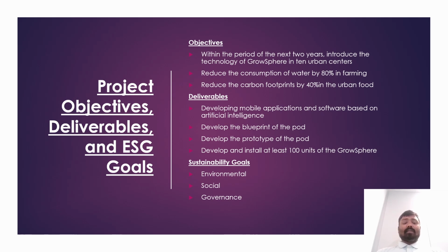Procurement and supply chain, emphasizing local sourcing, certification audits, and contract negotiation. And deployment and commissioning, for on-site assembly, functional testing, and community pilot rollouts. Fifth is monitoring and optimization, which is our continuous feedback loop measuring water, energy, carbon, and social impact KPIs. By giving each process its own lane, you can instantly see sequence, parallelism, and handoffs, critical for avoiding the silos that often derail complex projects.